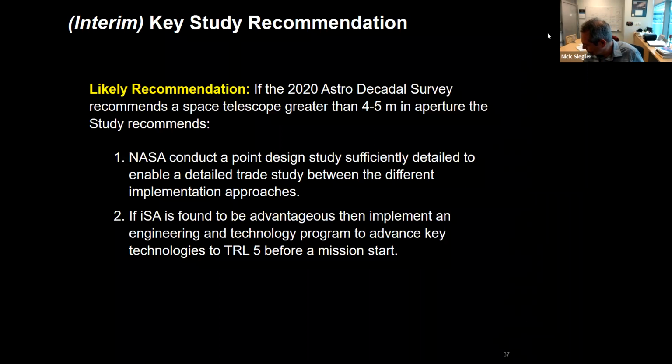The overall assembly time, based on things that we do on the ISS, some of the things that are being planned for the NASA tipping point activities that will have in-space assembly demonstrations, and what was done on Orbital Express, for example, is expected to be about 6 weeks for the end-to-end assembly and the commissioning of the observatory. Nominal processes holding good. If there are off-nominal issues, well, they need to be handled on an as-needed basis.